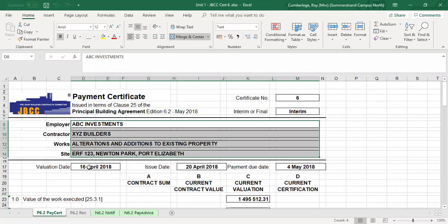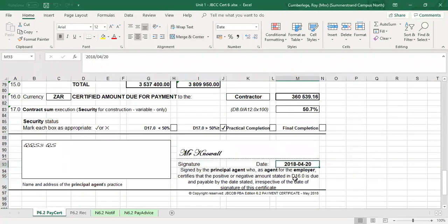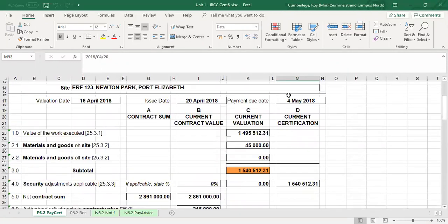Then we have a couple of dates. The first one is your valuation date, and that doesn't have any effect on your payment certificate — it's only for noting on which day you were actually on site for this specific valuation. What is important is the issue date — that's the actual date on which you forward your payment certificate to the principal agent or architect. At the bottom of the certificate, you'll note the date of the 20th of April, which determines the date of payment, which is 14 days after the issue date. So if the certificate is issued on the 20th of April, then the contractor must be paid on the 4th of May.